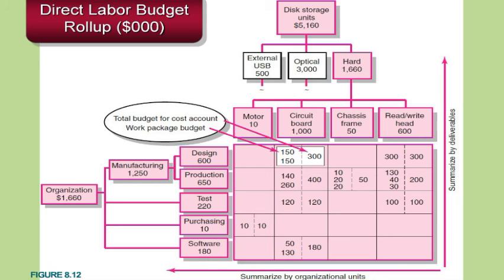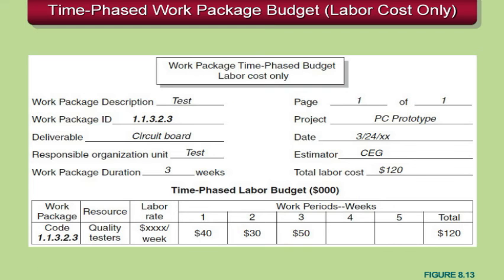But we can get very specific and see where the budget dollars were actually spent when we have our cost allocated properly. Looking at this example further, we can see that for the work package testing, we spent $120. We identified through this report when it was done, who did it, and what weeks the dollars were required for the work to be done.